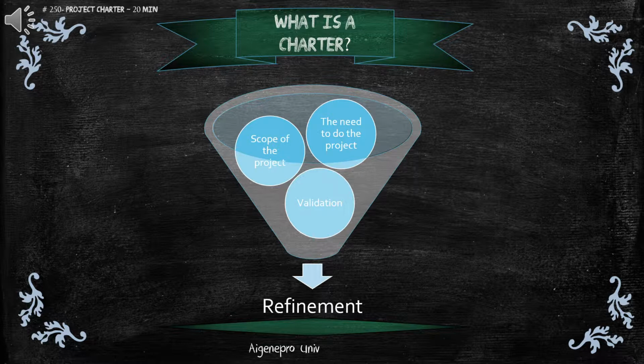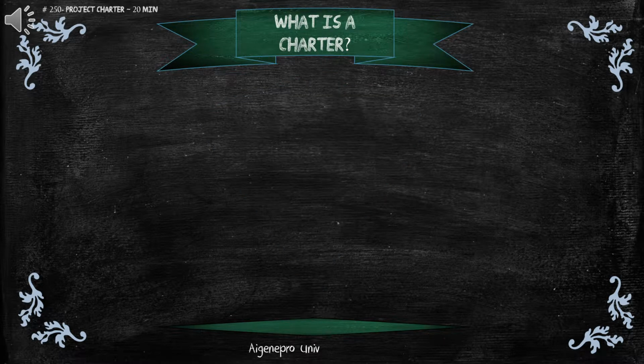Six Sigma Project Charter is not a static document. It is a living document, which means, as you discover more, you narrow the scope. You refine the charter and make it reflect the updated direction, and at the same time you get validation from the stakeholders. To understand how to make a project charter, you must first understand all the activities done in the define phase and all deliverables expected.